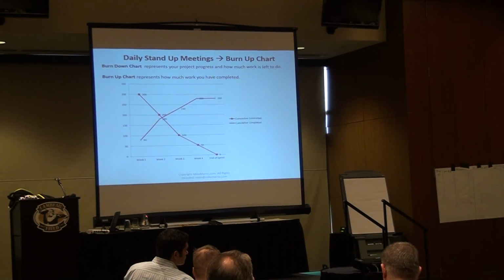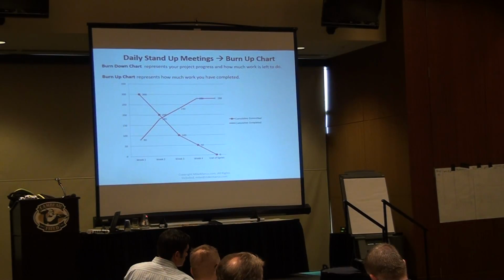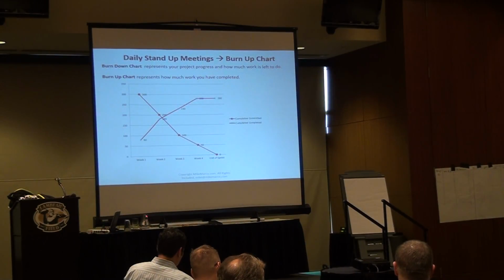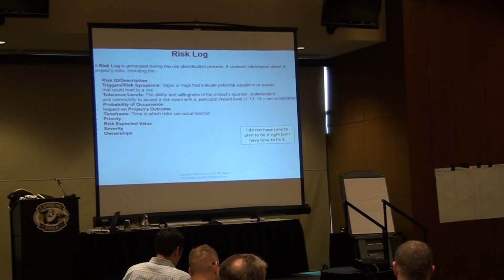In traditional management, what are the things that I ask my team? I ask a few questions such as, what is the percentage complete? What is the new delivery date of your test? How confident are you that you're going to deliver that date in percentage? And what are the risks of success or failure? You see the difference in Agile. I ask you what you did yesterday, any risk, what you're going to do today. In traditional management, percentage complete, what is the new date? How confident are you that you're going to deliver? And what is the risk of success or failure? Because we also have the risk of succeeding, of delivering things, which means I deliver something and now it's too late to change.